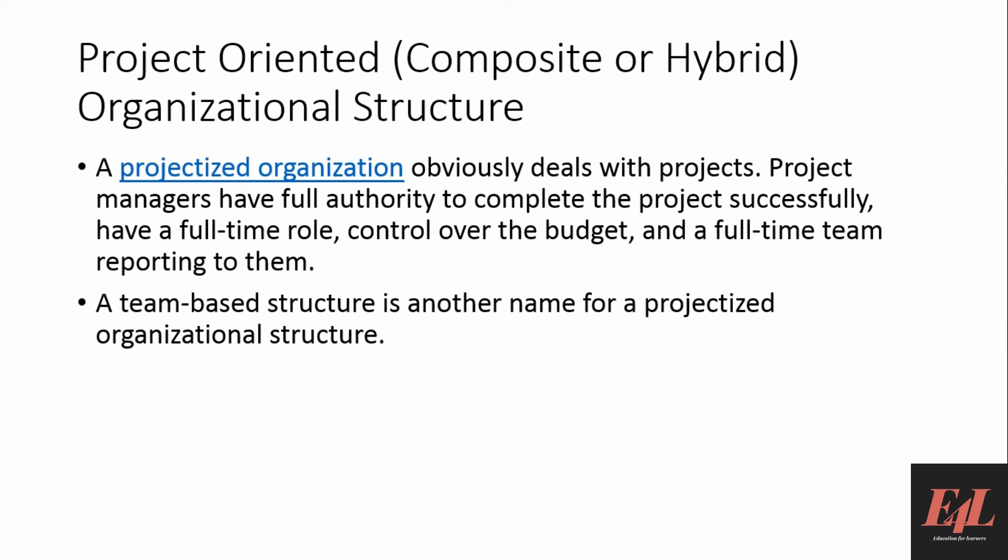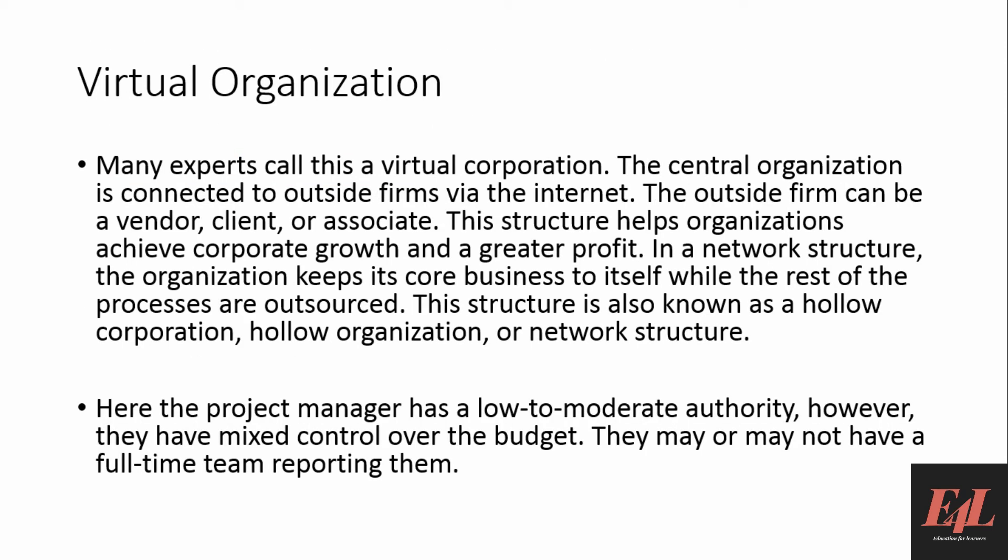The project-oriented or composite structure obviously deals with projects. Project managers have full authority to complete the project successfully, have a full-time role, control over the budget, and a full team reporting to them. A team-based structure is another name for a projectized organizational structure.